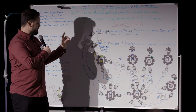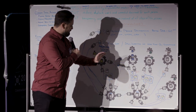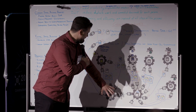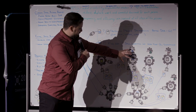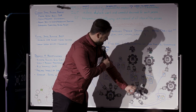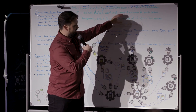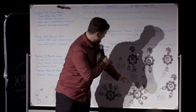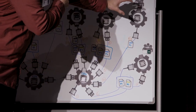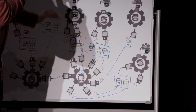We traced one submittal — one light fixture across multiple documents — through all the steps. A trade contractor submits to the CDX, which disperses it to the GC who verifies everything is there per what was agreed with the architect and owner. Instead of each person receiving the entire package, the system disperses only what each role agreed to see: an engineer gets the shop drawings and data sheet; an owner just needs the final approval; an architect sees what's approved at the end.